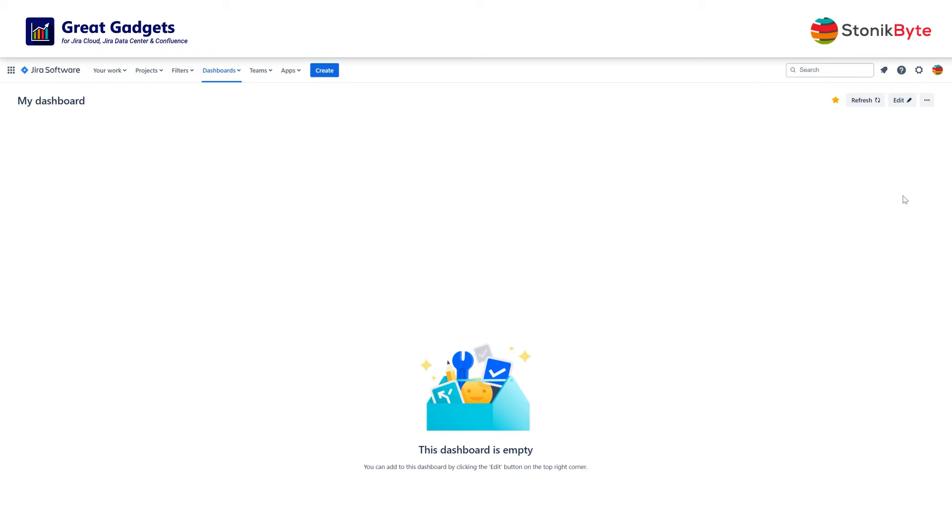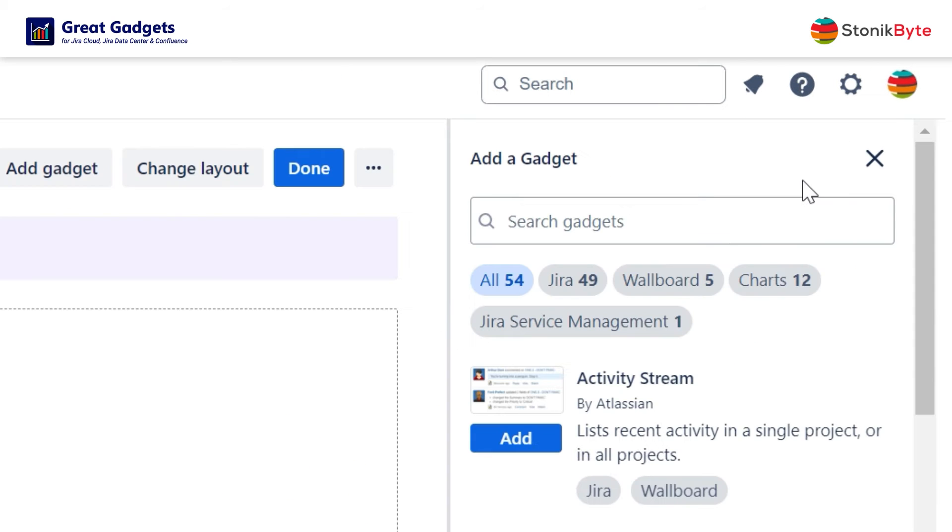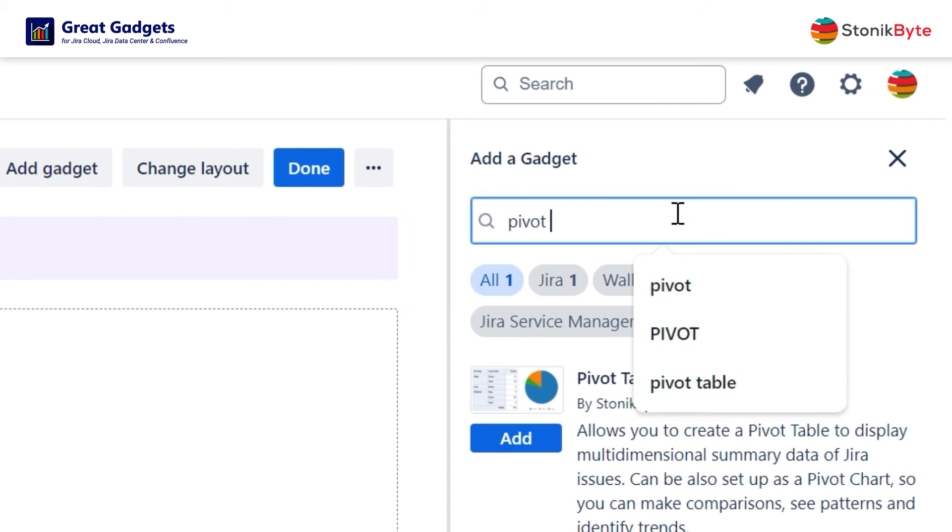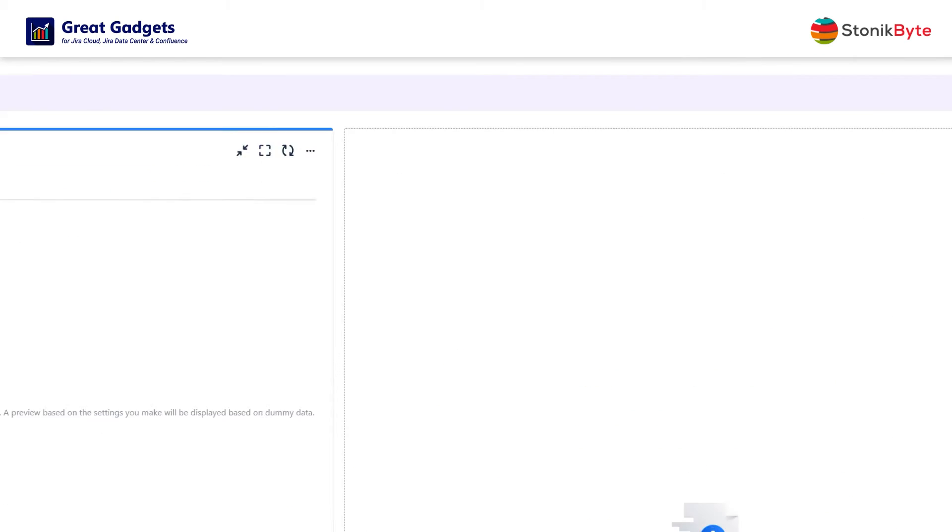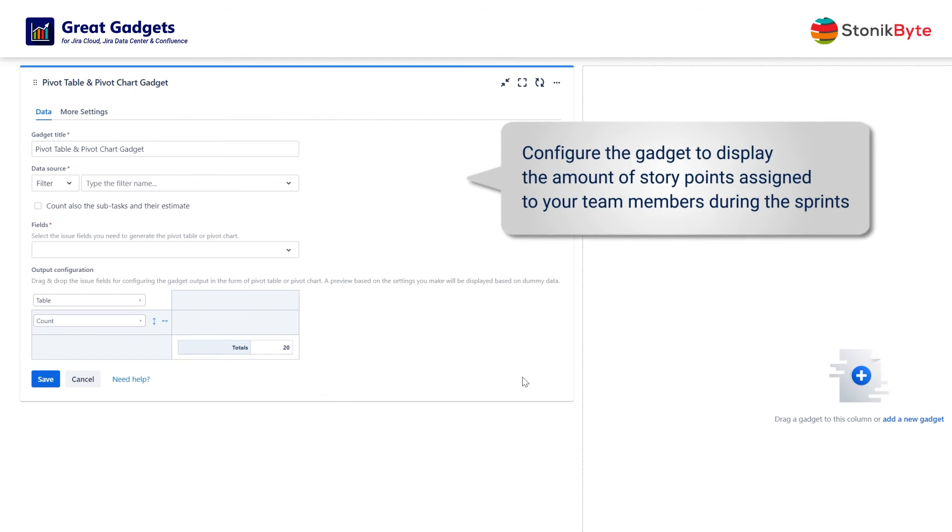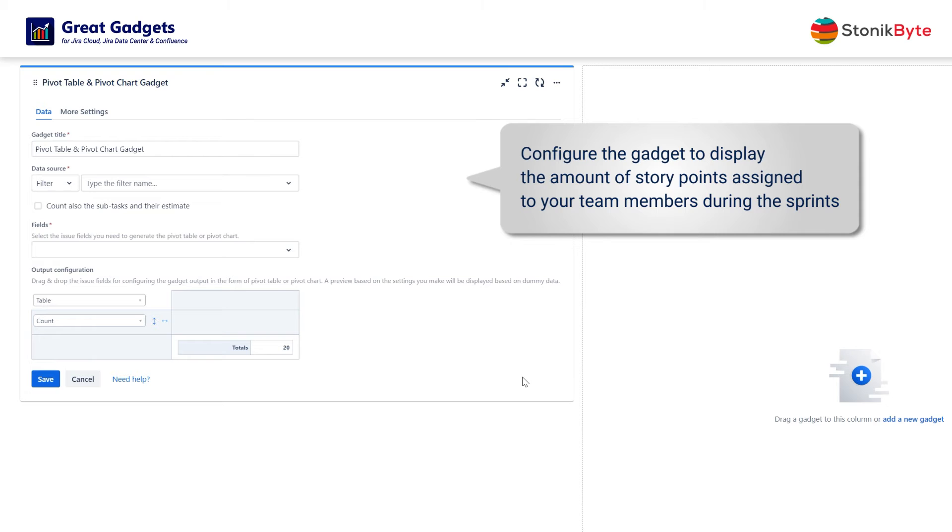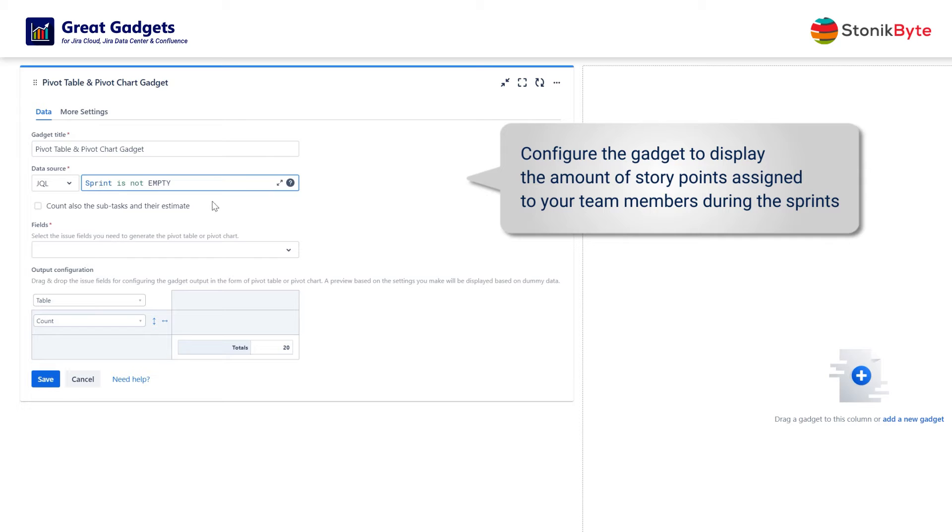Here are some specific examples. Let's say you want to display the number of story points assigned to your team members during the sprints. To do this, at the data source, select a filter or enter a JQL that returns the issues assigned to a sprint.